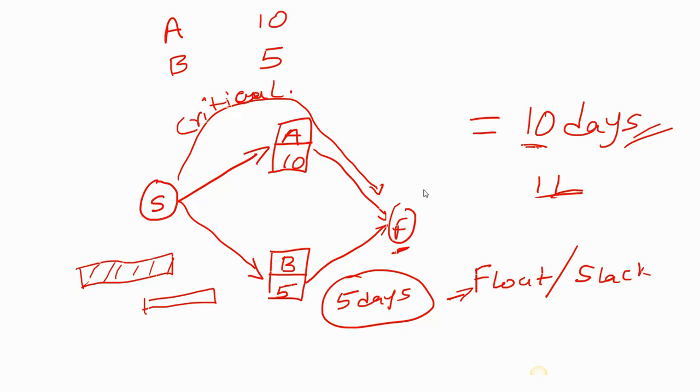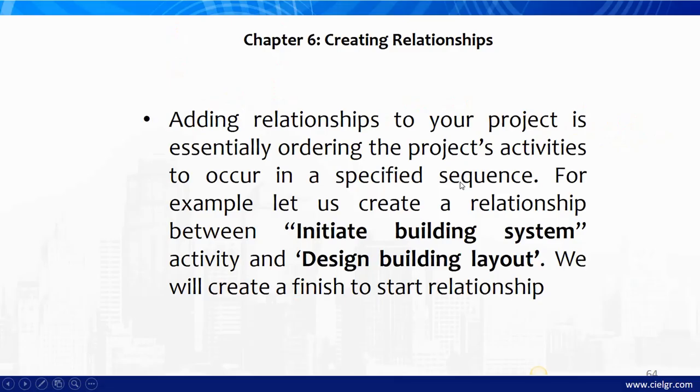If we take a look at the activities that are not on the critical path, you notice that all of them will have float. The float tells you how long those activities can be delayed. But for the activities on the critical path, if you check the float, you're going to see that all of them will have 0 float. Because, like I said, you cannot delay an activity on the critical path, and if you delay it, it will of course affect when the project would finish.